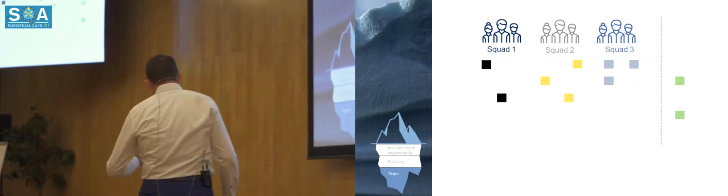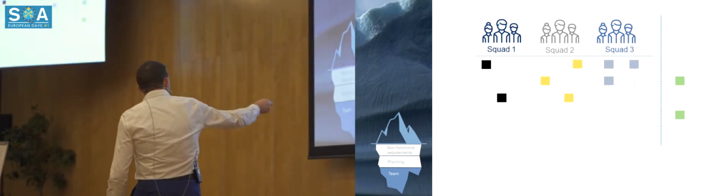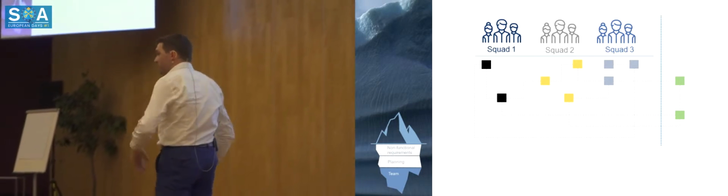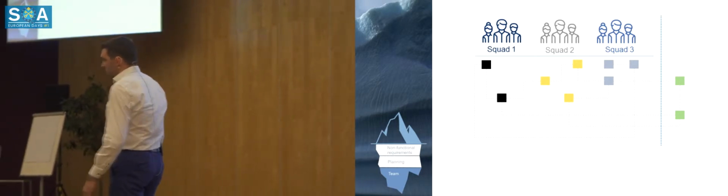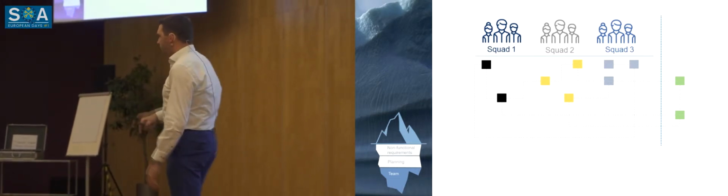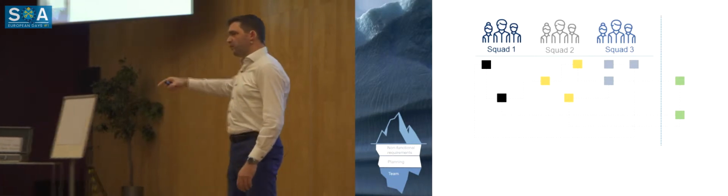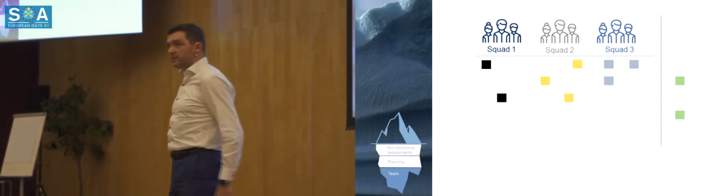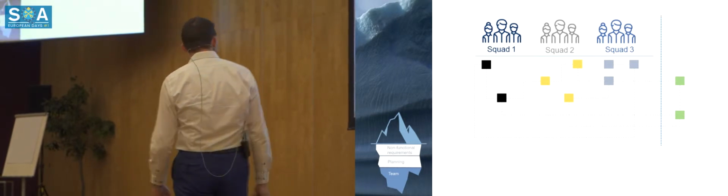And we went back to our Scrum Master, we say, hey, we need a guy from the firewall because we have some issues. Yeah, not possible. This guy is already planned in his sprint. You have to wait till the next sprint. But we say, hey, then we can do nothing because we need that guy.